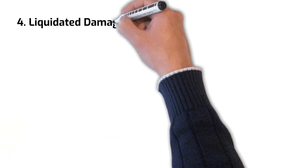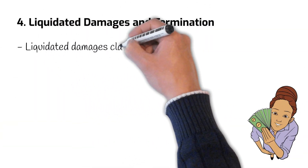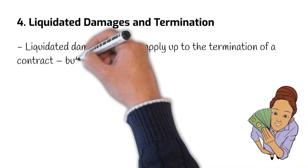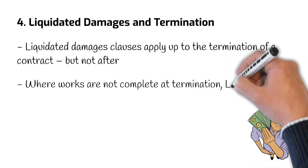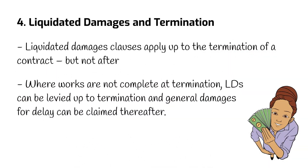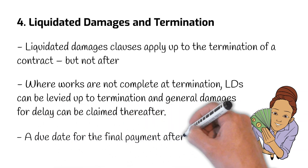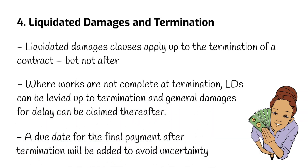Number 4: Liquidated Damages and Termination. Liquidated Damages clauses apply up to the termination of the contract, but not after. Where works are incomplete at termination, LDs can be levied up to the termination, and general damages for delay can be claimed thereafter. Clear wording will be required should the parties wish to agree a different approach. Also, a due date for the final payment after termination will be added, removing the uncertainty as to when the final payment after termination is due.